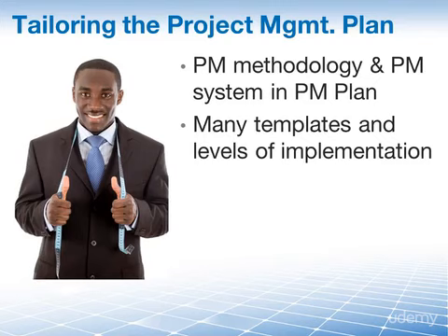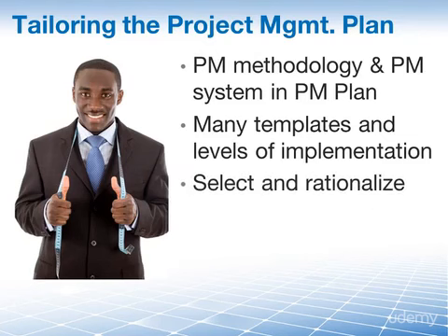Not every project needs all 50 templates, and we don't use every single chapter in every template. That is why we tailor the system to our project. Select and rationalize and make it best fit the needs and the complexity of your project.